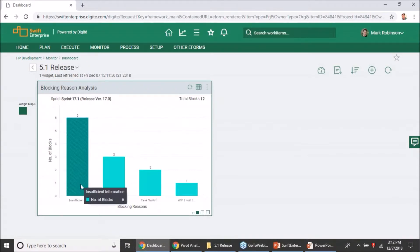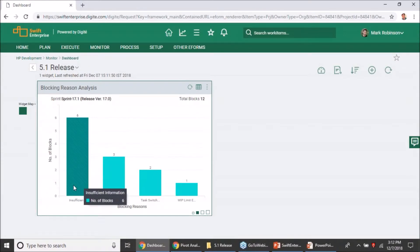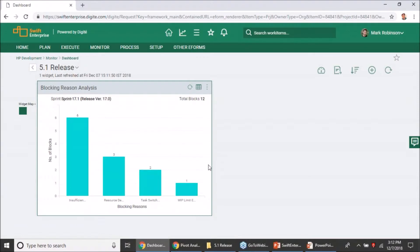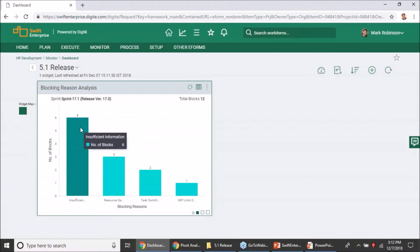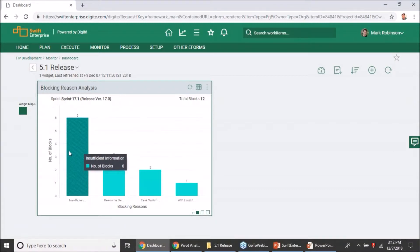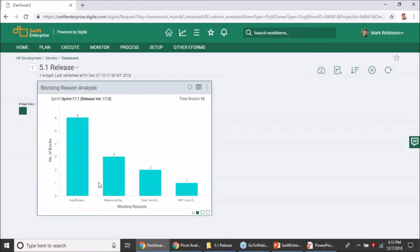In this case, I have had six blockers with insufficient information, three with resource dependency, couple of them for task switching, and one for the WIP limit exceeded. It is going to be sorted by the most number of blocking reasons that have contributed to the blocks. You will be able to focus quickly on which are the reasons that you would want to address first and reduce those reasons the next time this new release or sprint starts.